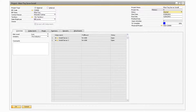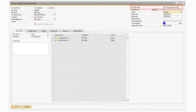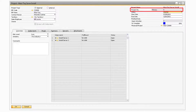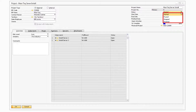Moving on to the right portion of the header will be several additional fields that relate to your project. The Project Name field will allow you to enter in a specific name for your project. Next, in the Project Number field will be the numbering sequence for your projects and it will indicate the number for the current project. Below that in the Status field will be a dropdown selection where you can choose the current status of the open project. If you select Stopped or Finished, the current date will automatically be entered as the Finish date.